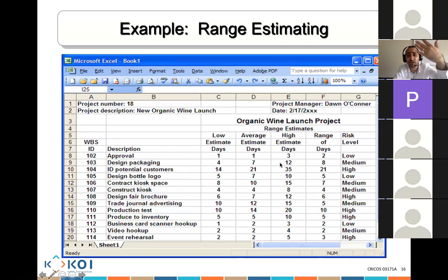Plus 1 time high estimate. So in addition to the 5, there's a 6. So to get the average of this number, you have to get the totals of these multiplications. You divide them by 6 because 1 plus the 4 times plus a 1, 1 plus 4 plus 1, that is a 6. Is it always going to be 6? Yes, in the PERT method of analysis, that's how it is. Okay, so it's always going to be 6 in this sort of analysis.